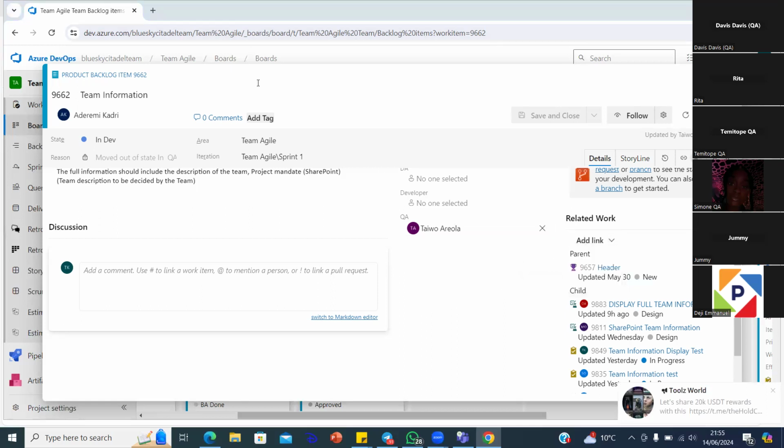Do you get it now? Because it's a bug, you just go to the bug and work on it. A bug would be like you're working on the story and you test that particular bug, right? And if you are going to be doing retesting, what you are going to do is retest the story, not the bug. You test the bug, you ensure the bug is fixed, but you go and retest the story. Basically, I've tested it before and it failed. This time around, because the bug has been fixed, I will go back and retest the story.